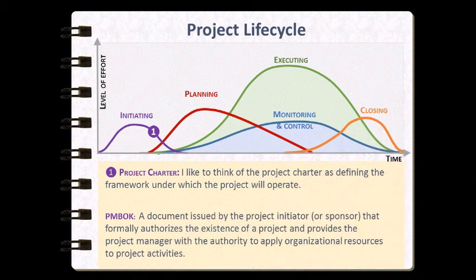So what do we know about a project charter? Many of us have never encountered a project charter before, and we might think of it as some kind of preliminary planning document. But this is not the case. A project charter is not an attempt to plan out the project. Instead, it authorizes the project's existence and gives the project manager the authority to commit resources to the project and proceed with the actual planning and execution of the project.